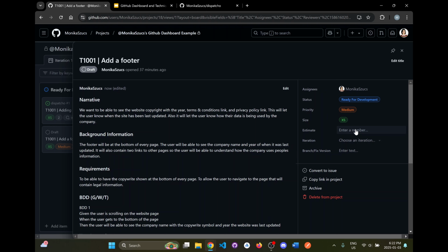I will say that this really is, if we're counting this, adding a footer with the links and just the text that's added, but also we have QA for quality assurance that's going to be doing their thing. Maybe it's a 1, maybe it's a 2, but because of QA, I'll just put a 2 for now because QA will need some time as well for it.